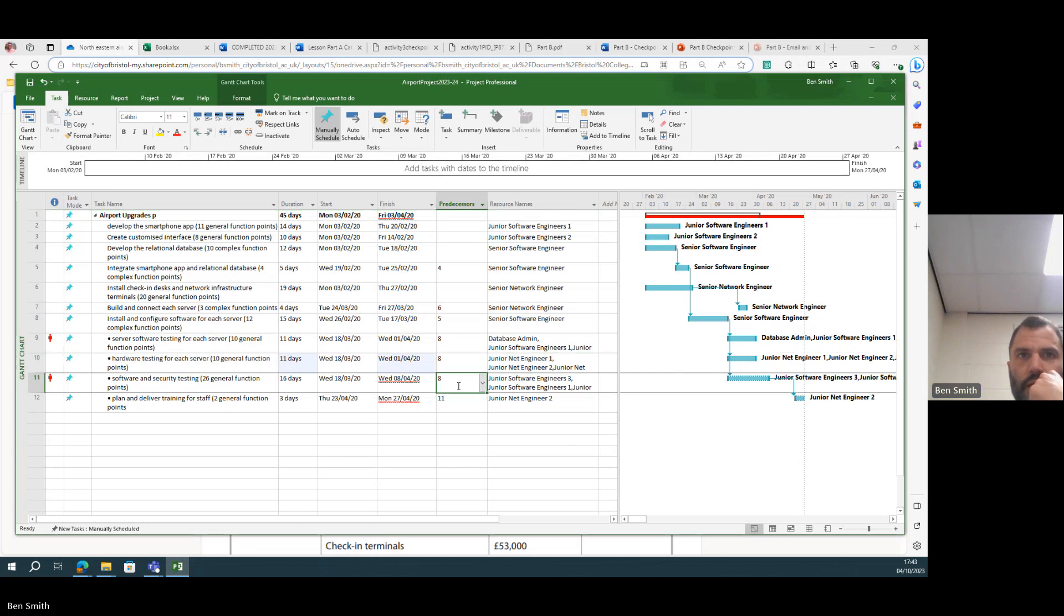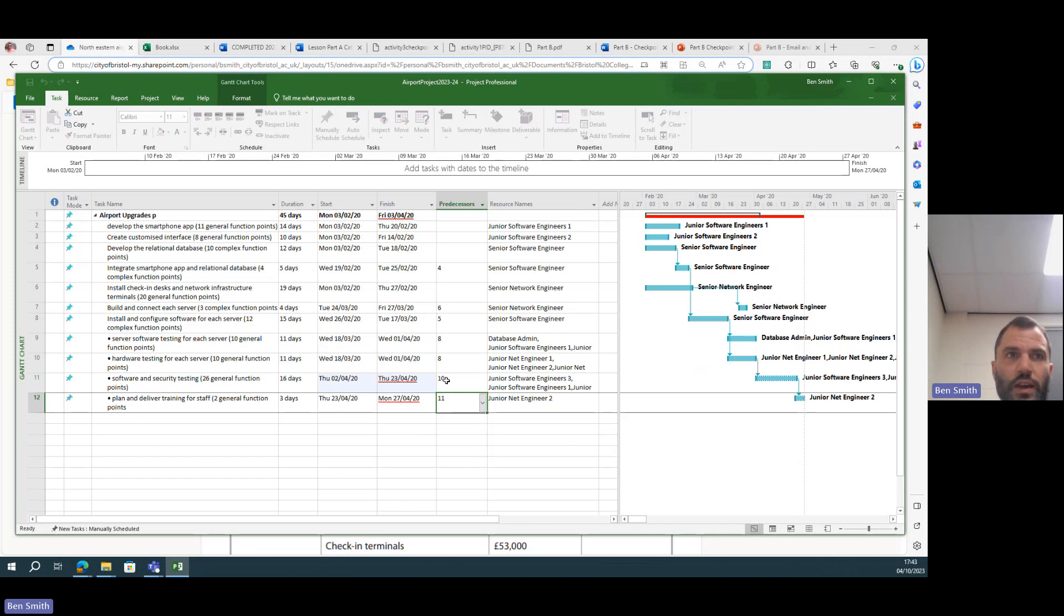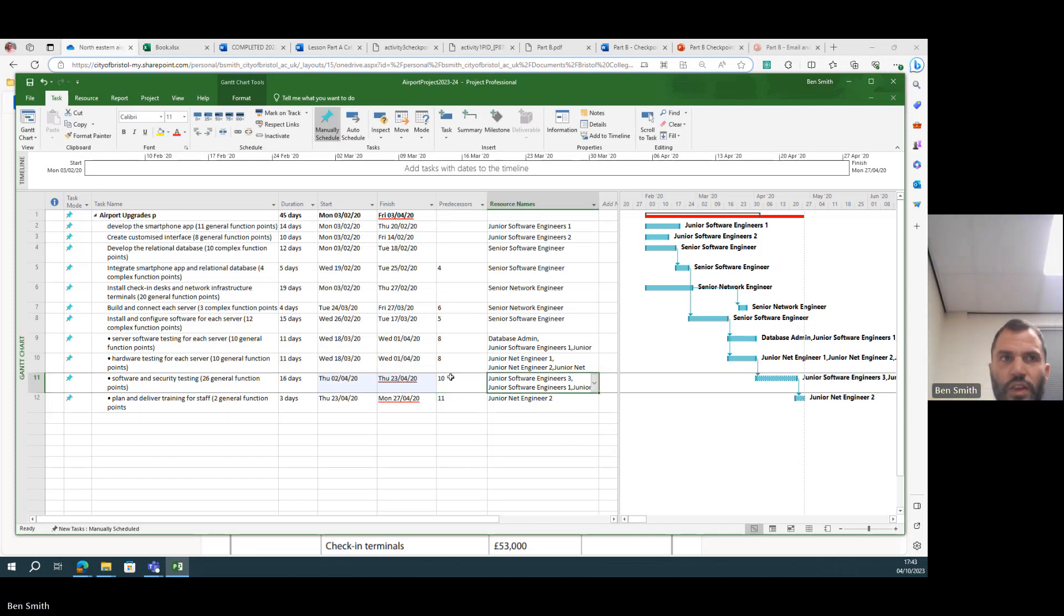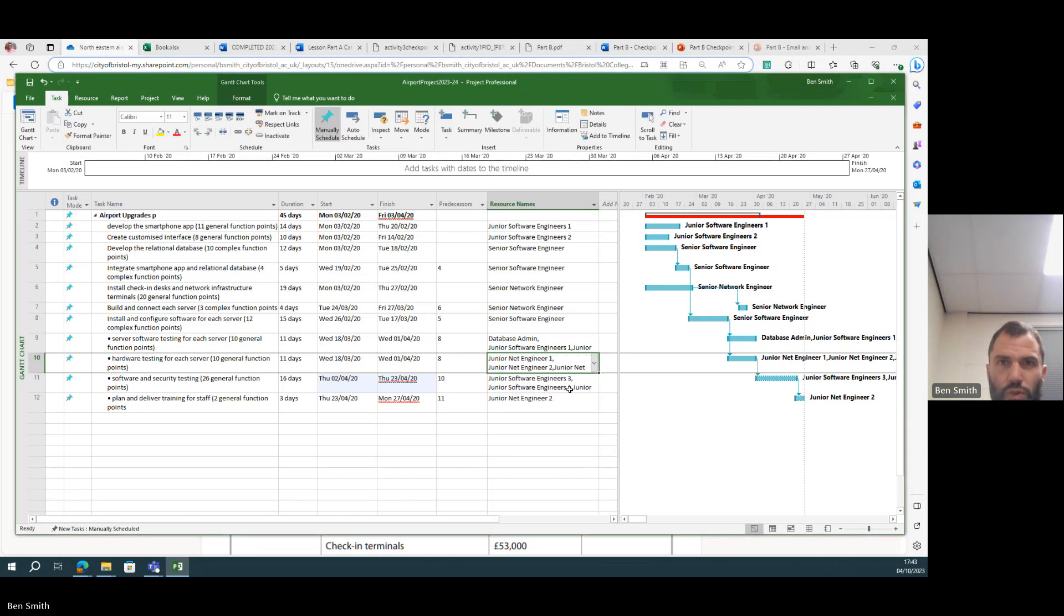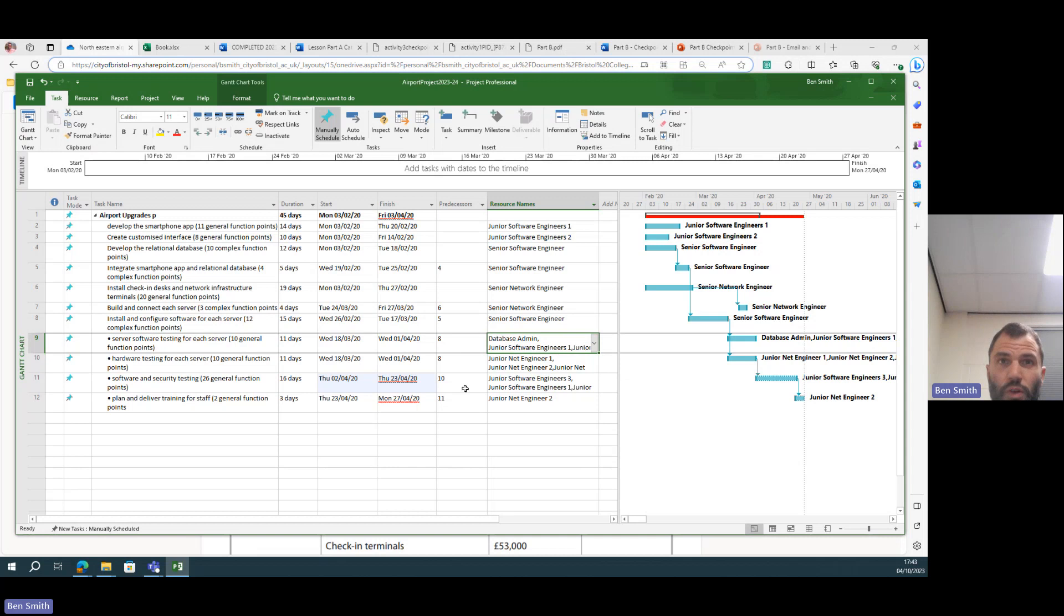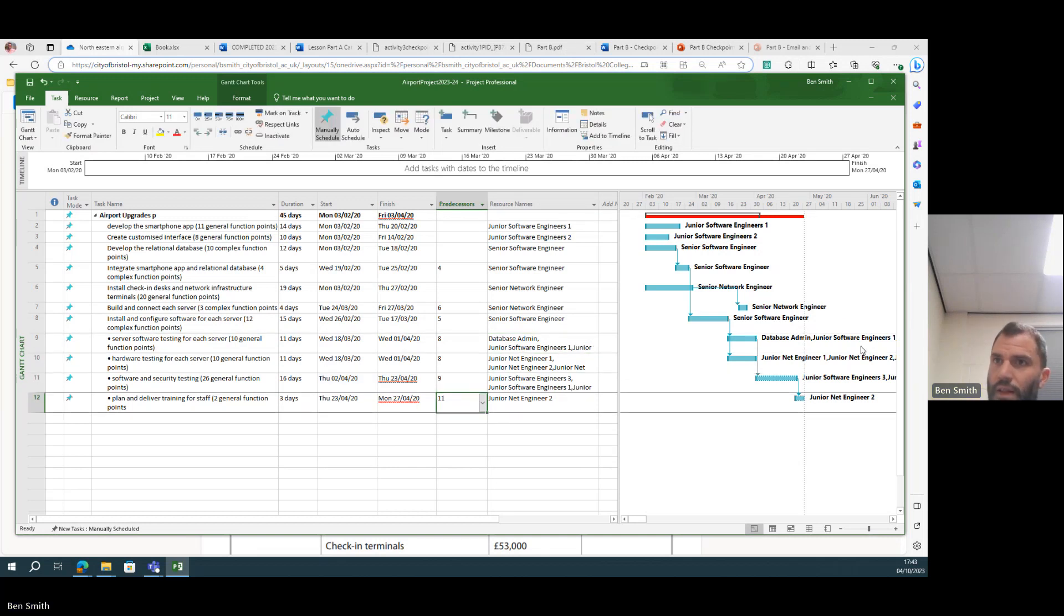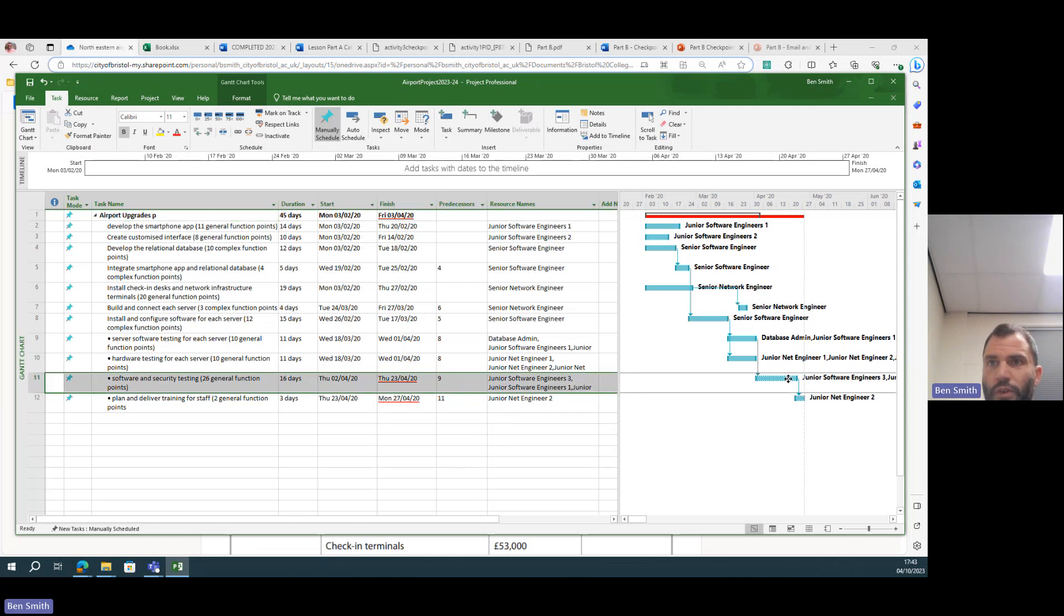Well, let's put that dependency on. So we cannot start this bit of software and security testing until this one is finished. Sorry, nine. And then you see this is the end of the project, this red bar, and it's still overrunning.